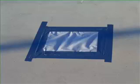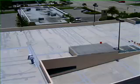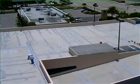Prior to moving forward, we perform concrete moisture tests at multiple areas of the deck to ensure proper conditions for the application of the waterproofing membrane. If the concrete is too moist, the waterproof membrane will not properly bond to the surface.